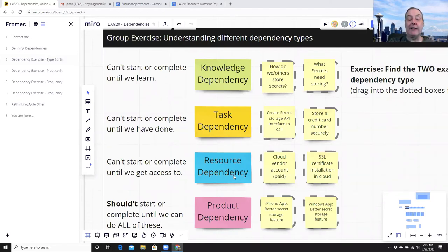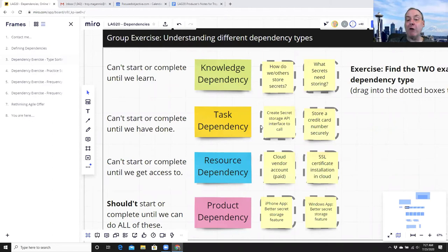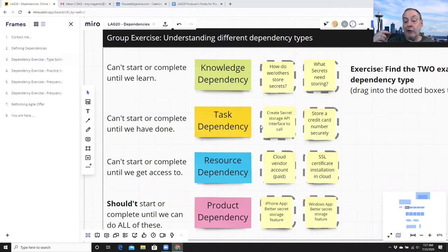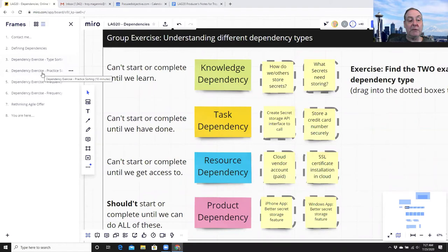When managing dependencies in a stand-up, scrum of scrums, or coordination function, the ones that will really hurt you are resource dependencies — dependencies on other people that require lead time. A task dependency means we can't build A until we build B. A resource dependency means we can't complete A until we get someone else to do X. So when forecasting a piece of work, ask: will we need help from anyone outside our team? If yes, start documenting it and give forewarning to those people. Setting clear prioritization about what should be started next is what this is really about.